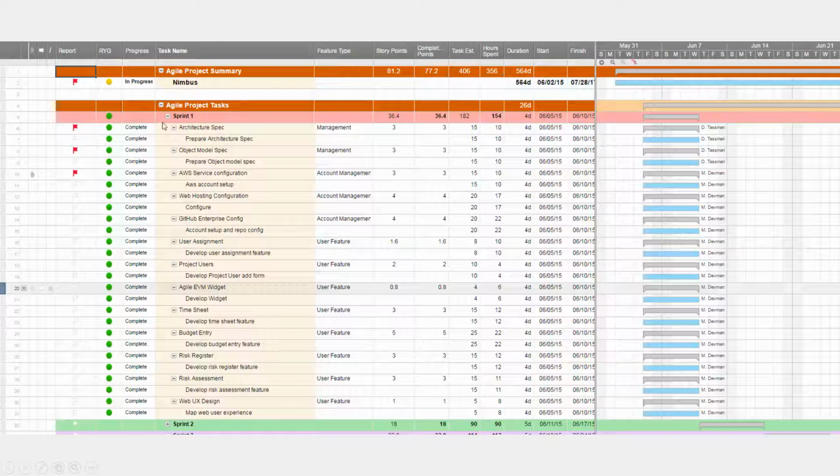So we have sprints all in here, and we'll go into a little bit more detail why I did all the sprints. Normally, I never put more than one sprint in advance. We only plan 2 sprints ahead, and that's because things change so quickly in the development cycle that it becomes more work to revise than it is to add them from the backlog a sprint in advance.